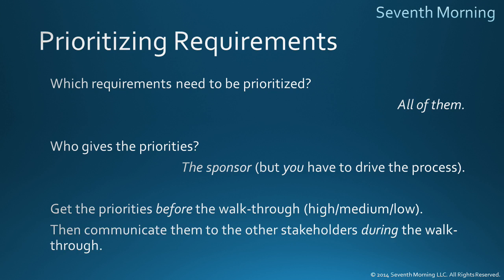After that prioritization exercise is complete, then you are ready for the walkthrough. During the walkthrough, you can simply present the priorities the sponsor assigned, along with the requirement. This process is pretty good because it keeps the prioritization in the hands of the sponsor where it belongs. But it also gives the other stakeholders the opportunity to contest those prioritizations if they have any concerns.